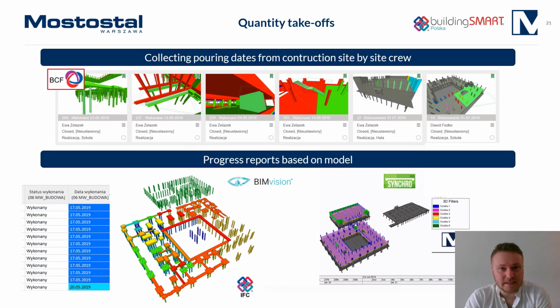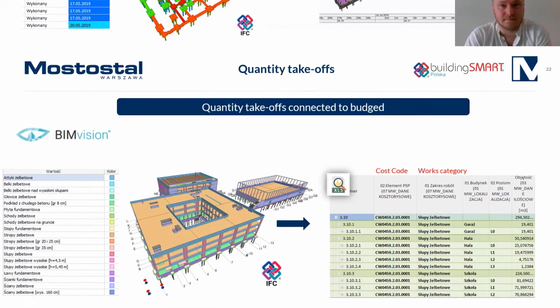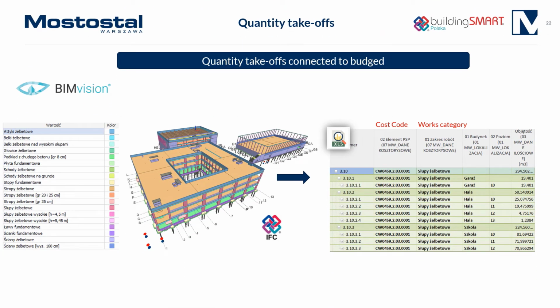The BCF format was used to report the completion of work done on site. By implementing such a solution, we can analyze the usage of materials over time. We also trained subcontractors to use BIM models, so that we could cooperate with model-based measurements and accept their work.